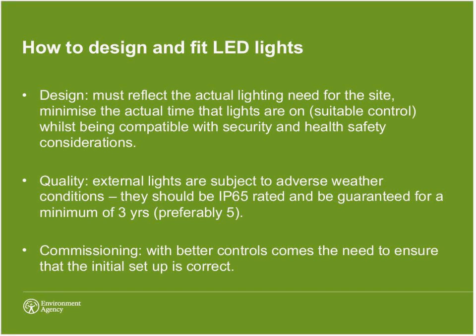Where possible as well, we've looked to submeter the existing external lighting load, so when the new install is put in, we can isolate the external lighting load and report on that separately. That's best practice, but in reality, on one of our sites the external lighting is fed from multiple different circuits, and to submeter them would be financially impractical. Some of our larger sites have a dedicated supply and a dedicated distribution board, so we've been able to do that, and of course that data can feed across to the sites where we haven't been able to.